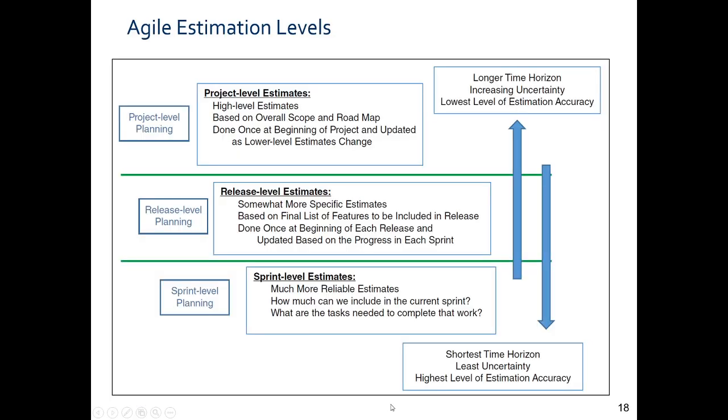So there are the estimation levels. How are the estimation levels prepared? First, you have to do project level planning, then release level planning, then sprint level planning.